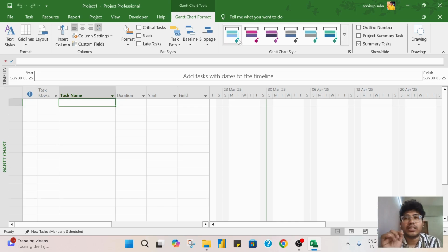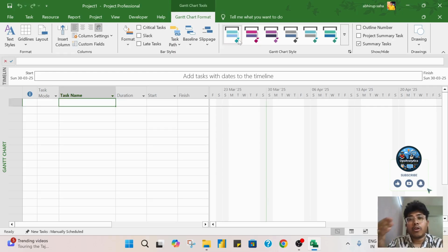And the arrow is basically used in Microsoft Project. Whenever you complete any task, after that the next task will come, so we can connect them by an arrow. Or if you want to start two particular tasks in parallel, in that case also there is a different symbol, a different structural method for the arrow. So that's why the arrow, this monitoring symbol bar and this particular line are there. This line tells the overall length of the task. Right. So that is basically the concept.